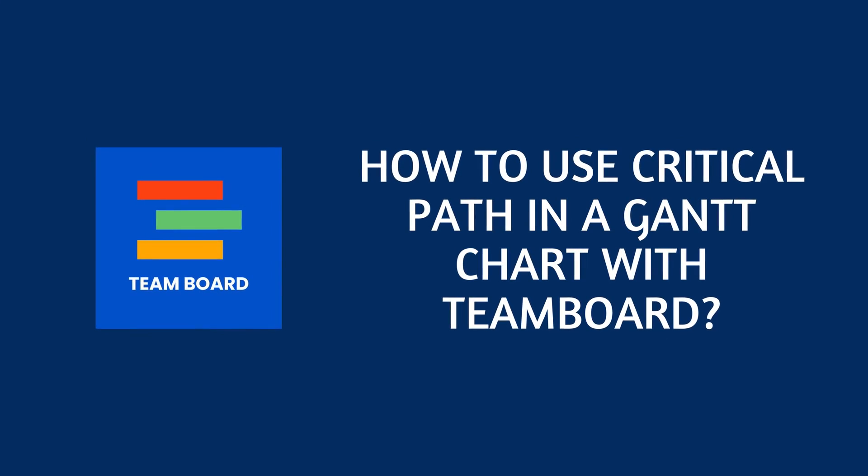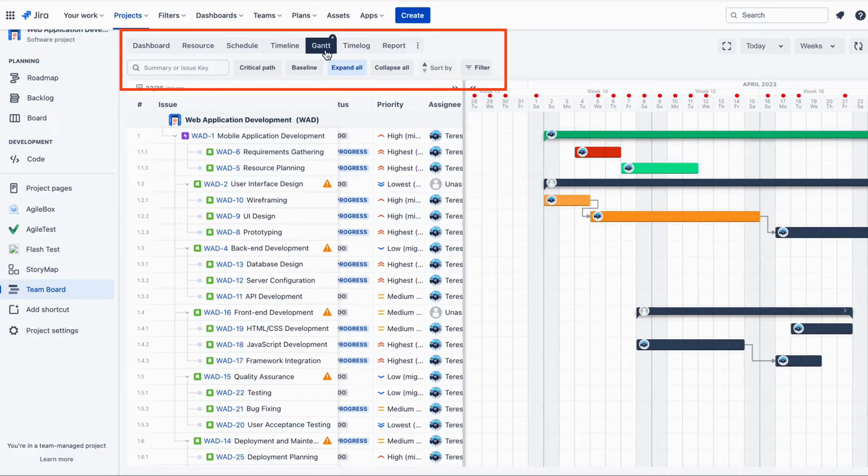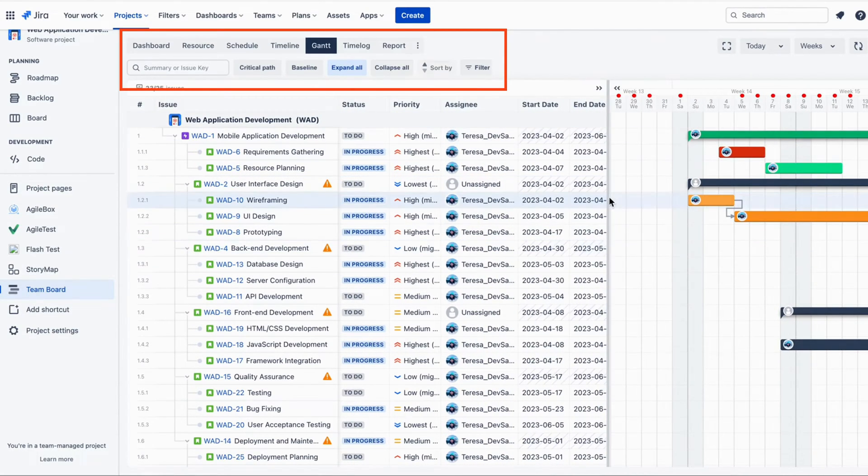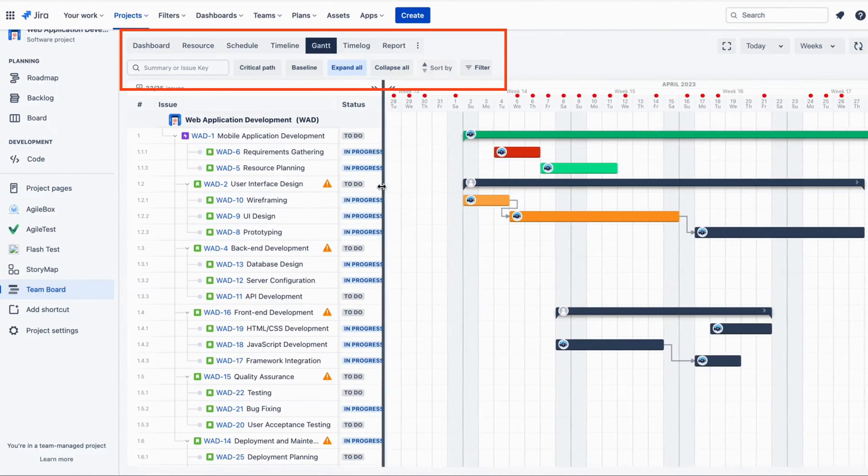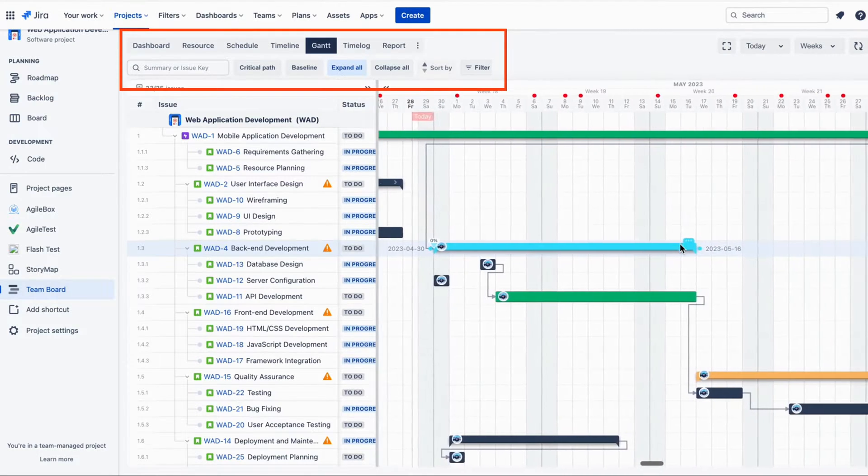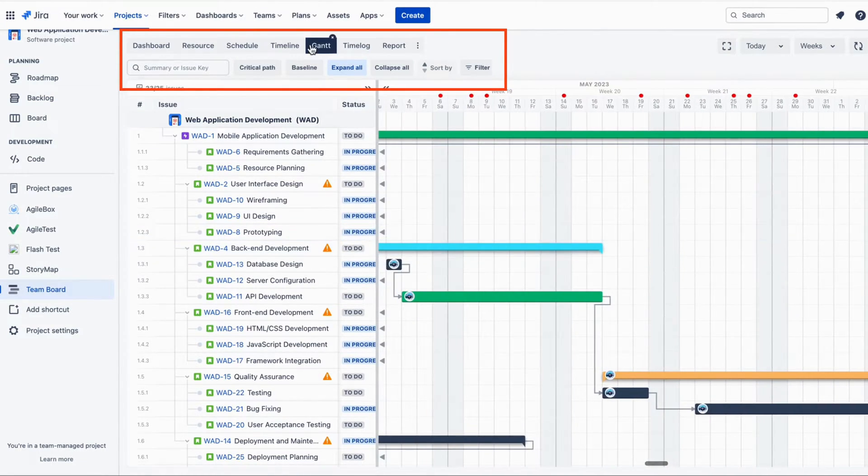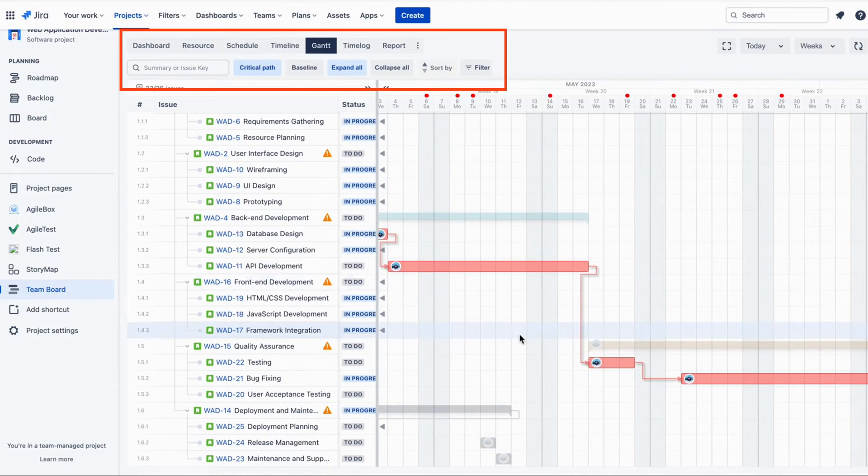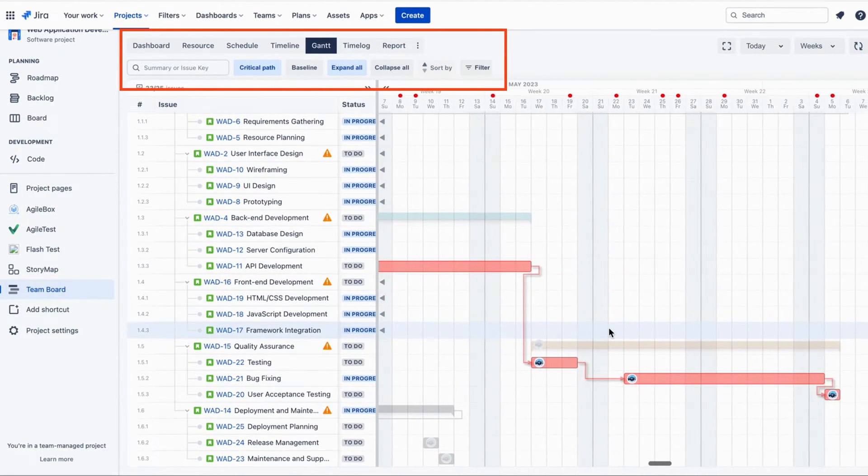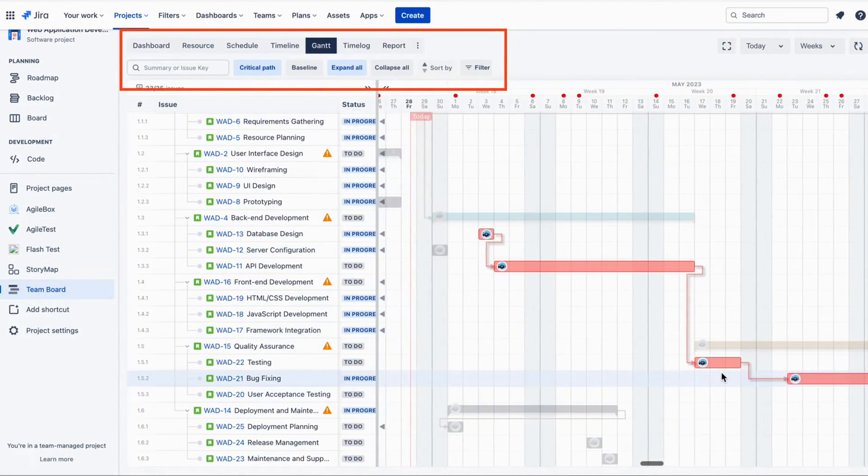How to use critical path in a Gantt chart with Team Board. To use critical path in a Gantt chart with Team Board, you first need to create a project and add all the activities, duration, and dependencies. Once you have created the Gantt chart, you can simply click on the critical path feature. With just one click, it will show you the critical path.